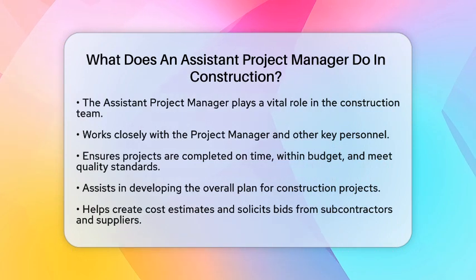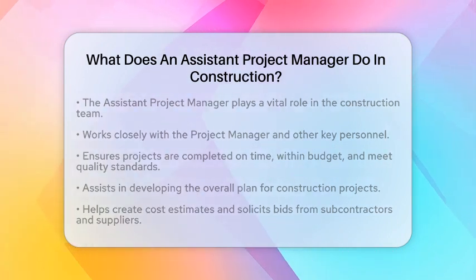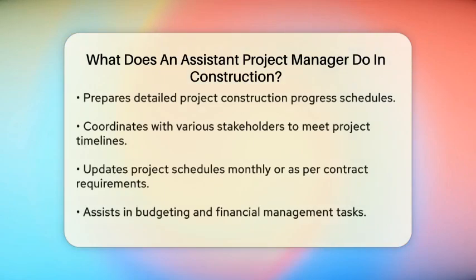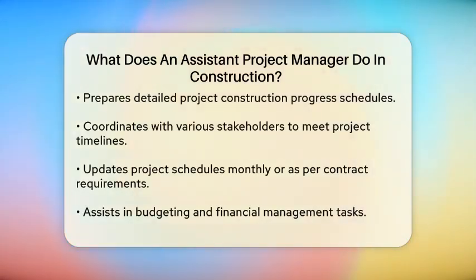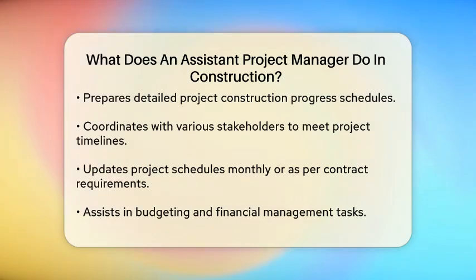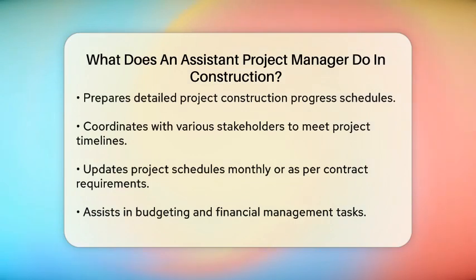Another important aspect of this role is project scheduling. The assistant project manager coordinates with the superintendent, project manager, subcontractors, and suppliers to ensure the project timeline is met. They update the schedule monthly or as required by the contract.